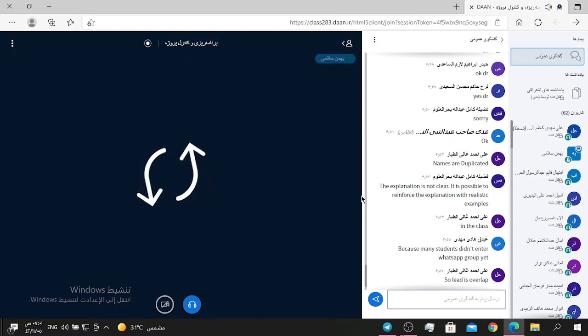Lag can also be represented in project schedule network diagrams as shown in figure 611 in the relationship between activity H and I. As you see, between H and I, we have a start-to-start relationship and 10 lag.